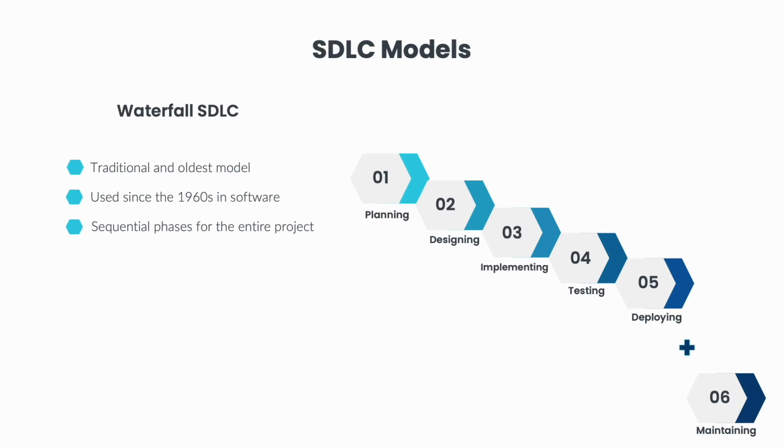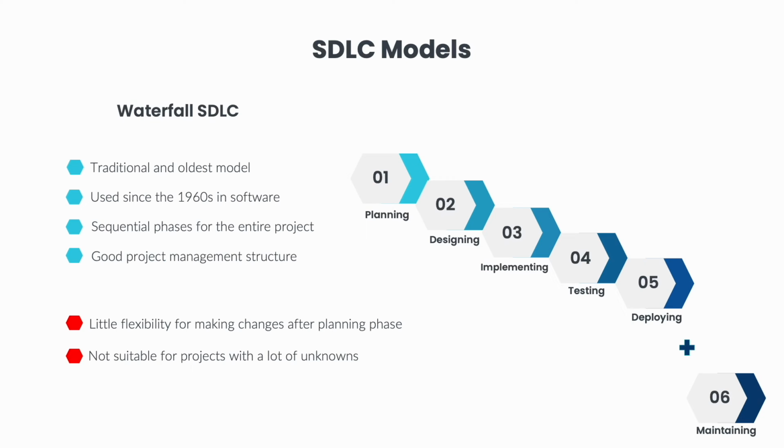This model does provide a good structure to project management, however, it has some big limitations. This model is not welcoming of changes in general to a phase that is considered already complete. For example, once we are in the development phase of a project, changes are not welcomed to the planning and design phases. In today's fast-paced digital environment, when changes come so often, it makes it difficult to successfully apply the waterfall model to a project, especially if the work involves lots of unknowns or newer technologies. In these scenarios, this model adds a lot of risk to a project.